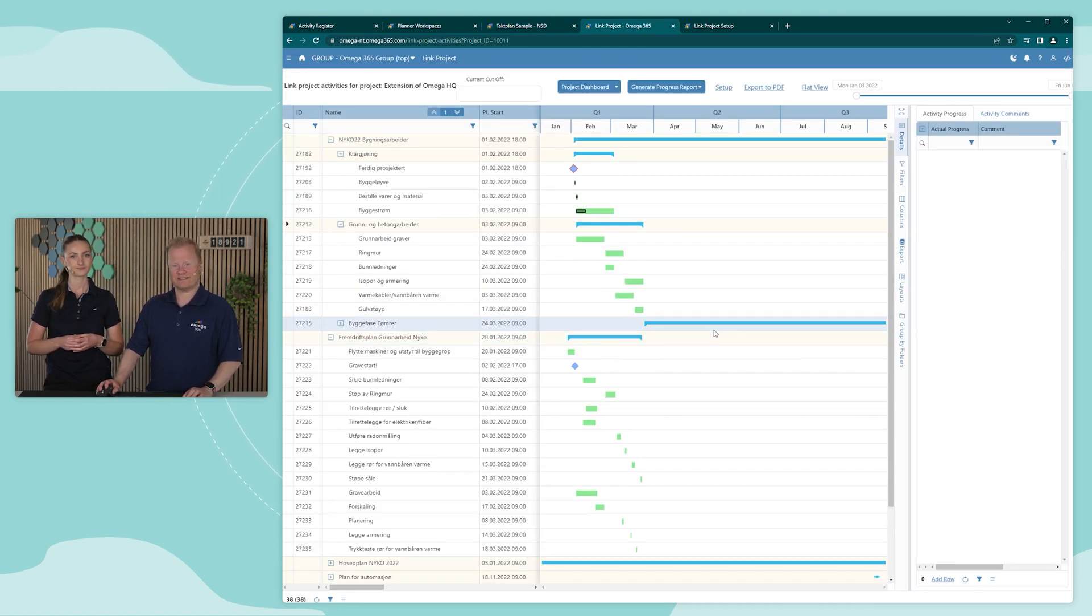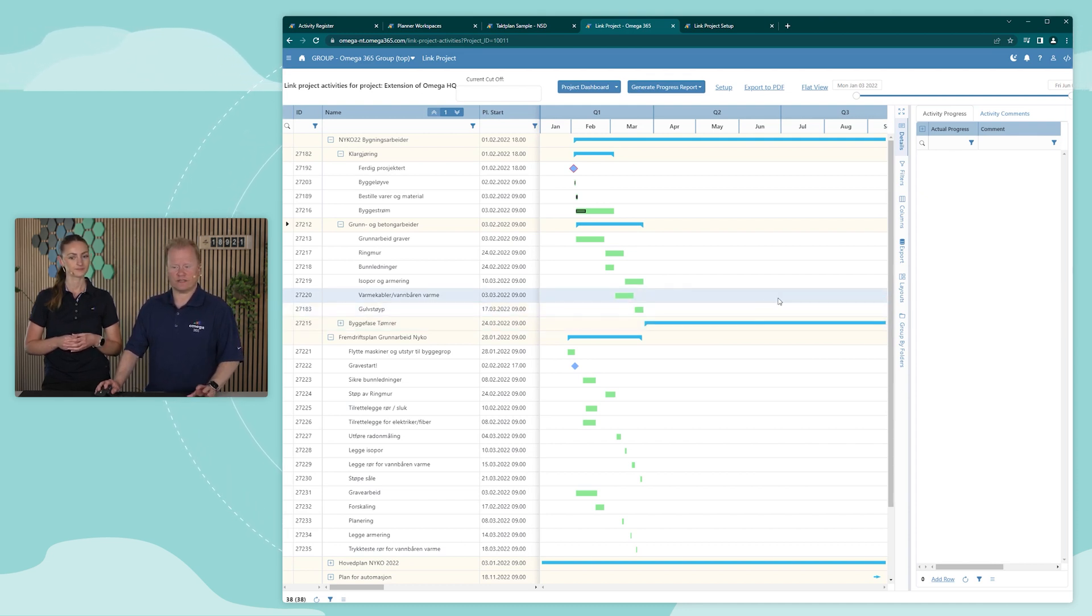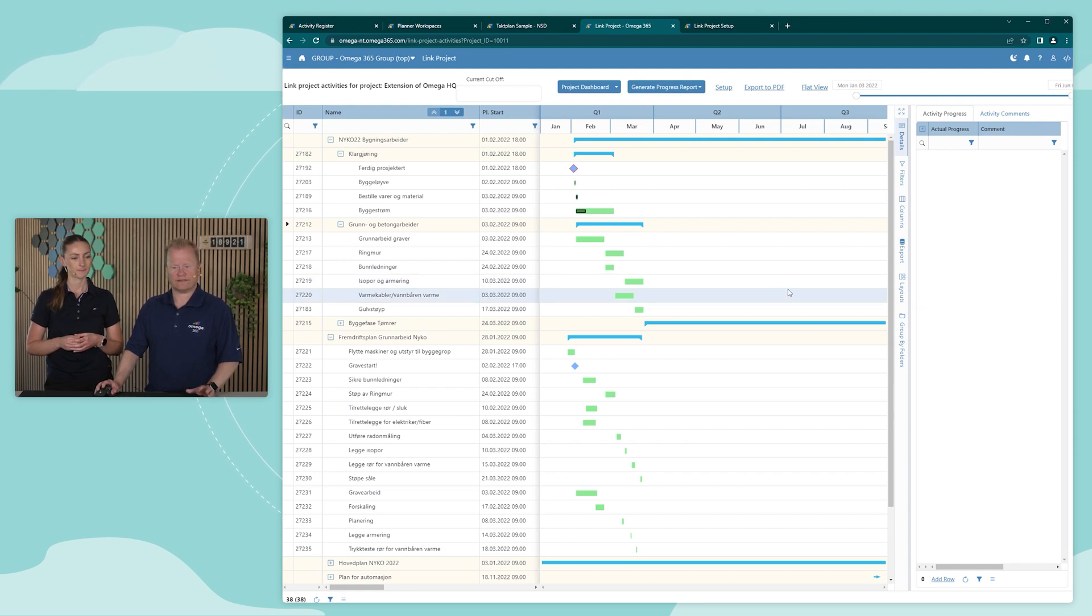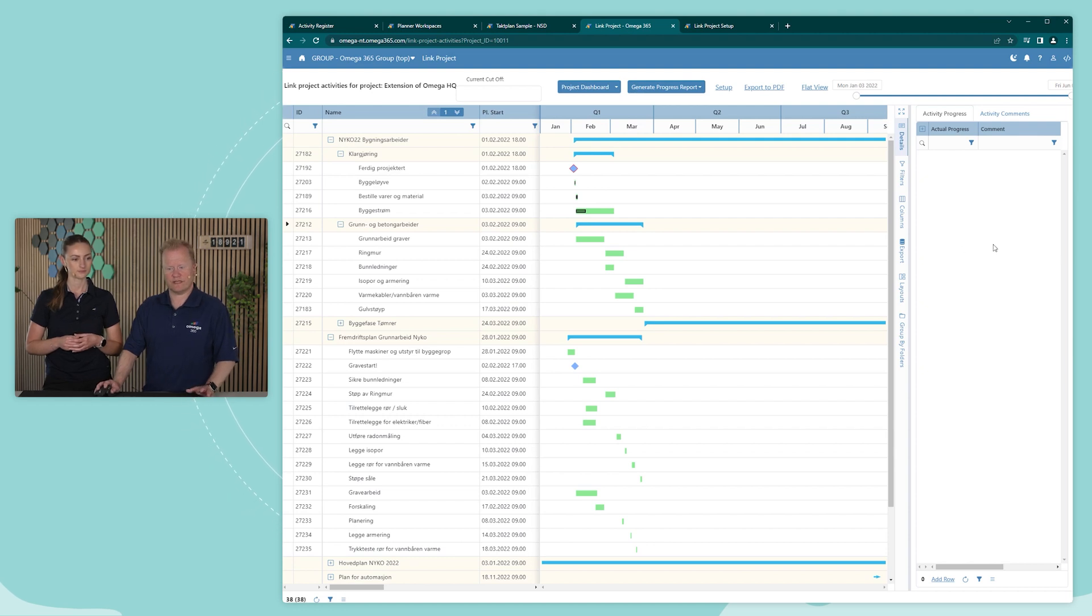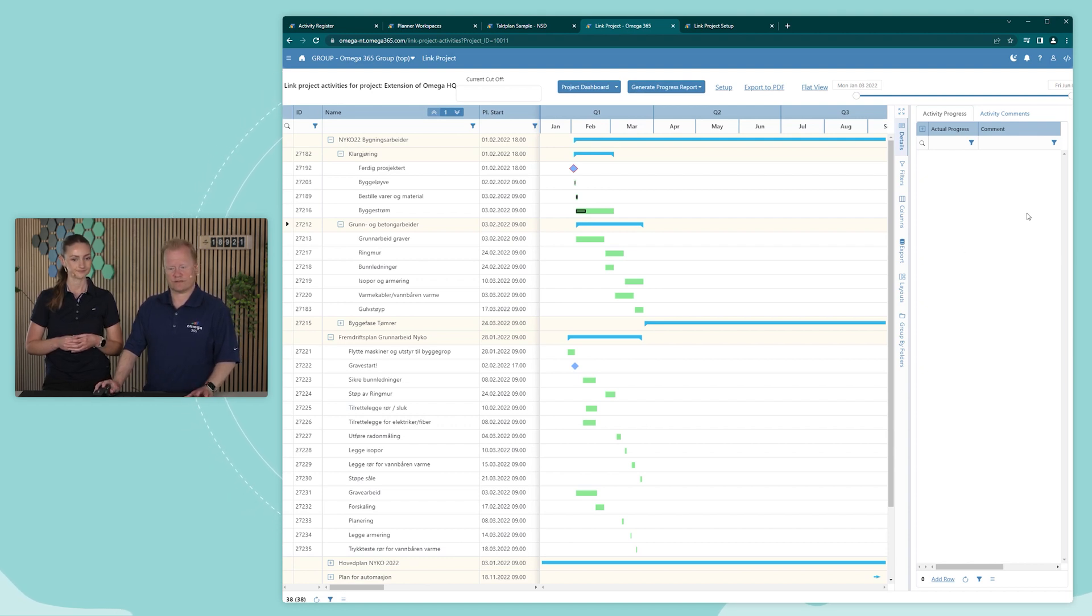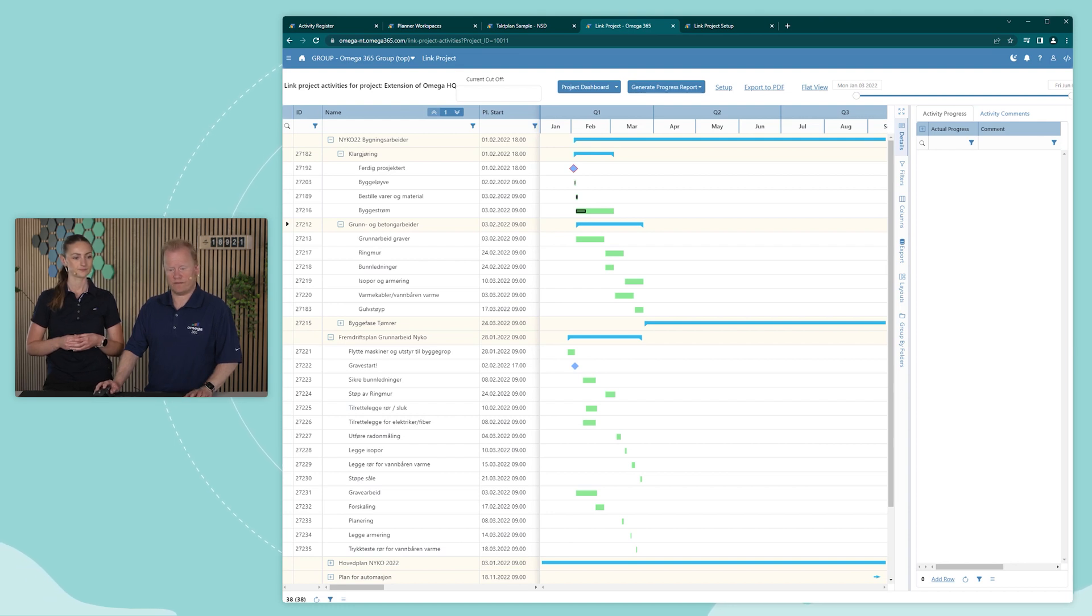In some cases, the scheduling is done by other organizations. For example, a subcontractor. Being able to import and analyze as well as keeping track of the different versions of the schedules provided from these organizations is essential in many projects. The link projects functionality provides these capabilities.